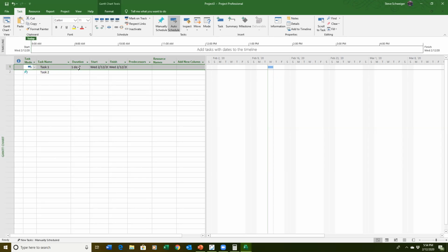Conversely, if I go in and I enter actuals or enter in the amount of work, because I could expose the work column here, put it in, and then as I add resources to it, it will say, oh, I'm assuming that resource is going to consume those hours at their particular rate of availability. Again, that may or may not be what you want. I prefer to enter in the hours at the assignment level.